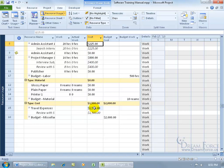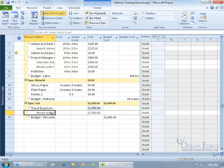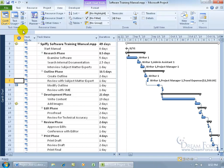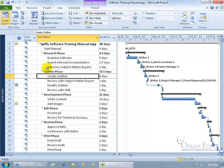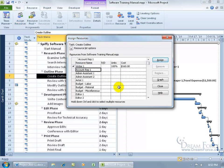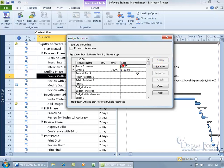There's the total. You can see it's been assigned to 'review with subject matter experts,' and we've got $2,000 which is the budget. From the Gantt chart, I can select a task and assign travel expenses to it: click the resource tab, click assign, scroll to travel expenses, click assign, then enter a cost — let's say $200 — hit enter, and close out.